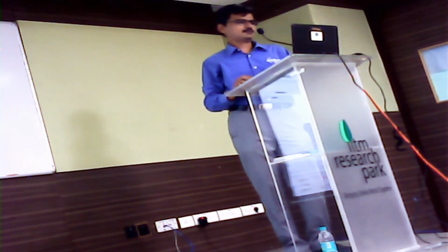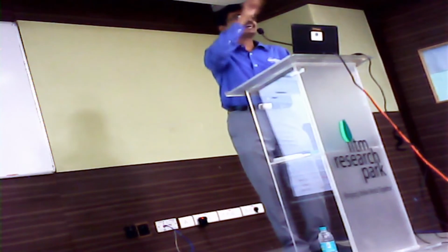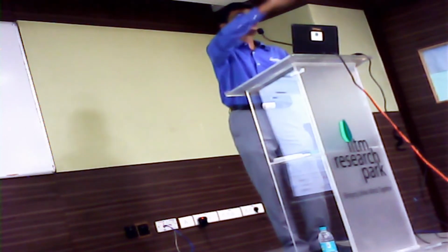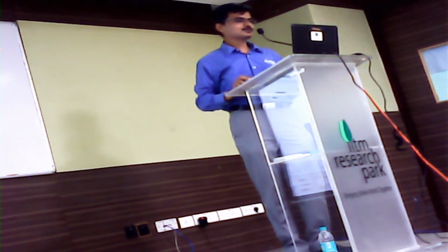No. I said it is estimated for 2 days. The moment you say actual duration is 5, it assumes that I have already completed that work. But if you still say work is still pending, go to the remaining duration and say it is 2 days. Now notice, out of 9 days, 7 days is completed. So now you will see the percentage is 70%.